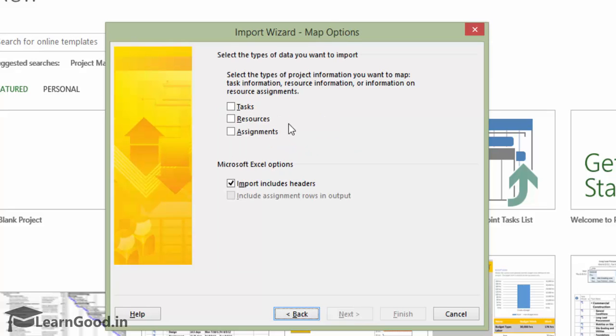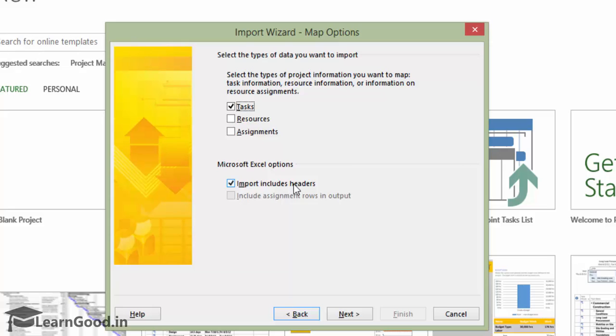In this screen on the top part, I select Tasks as my sample data did not have any resources or assignment data. In the bottom part, it is asking me if my data has a header. I leave it as it is and click Next.